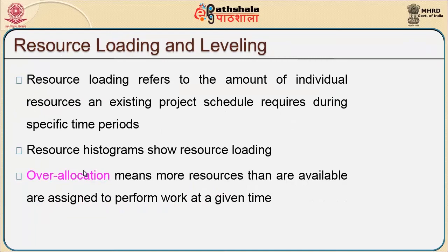The next thing that we may have to talk about is resource loading and leveling. Resource loading refers to the amount of individual resources an existing project schedule requires during specific time periods. A resource histogram shows resource loading.